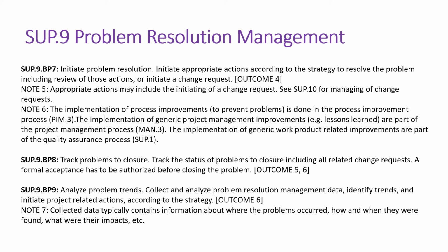You need to identify the step-by-step actions which are required to resolve that particular problem. Sometimes after identification of the problem, when you do the impact analysis, you will get to know that it's not a part of your requirement. That's when you need to initiate a change request to address what is not in the scope of the project.